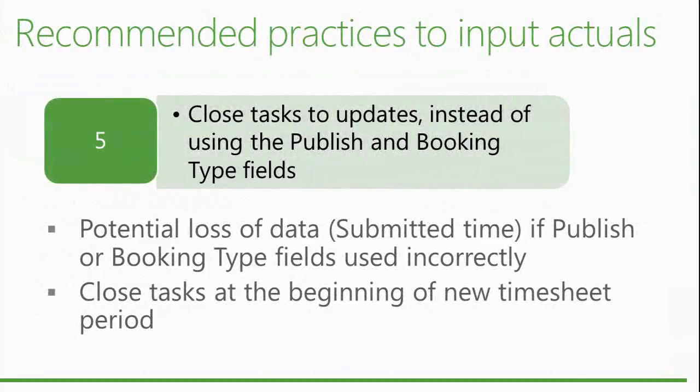Yes? What do you do if you have more than 100 people in your organization? What do you recommend? What I would do is, 100 is not the maximum limit. It's the one that is in the paper. If you put 200, 300, it's not going to break. It's going to have an impact on the performance. So what I would do is try to have a number that matches what you have, basically, and see how that works. If the response time is really very slow, I would try to break it down.